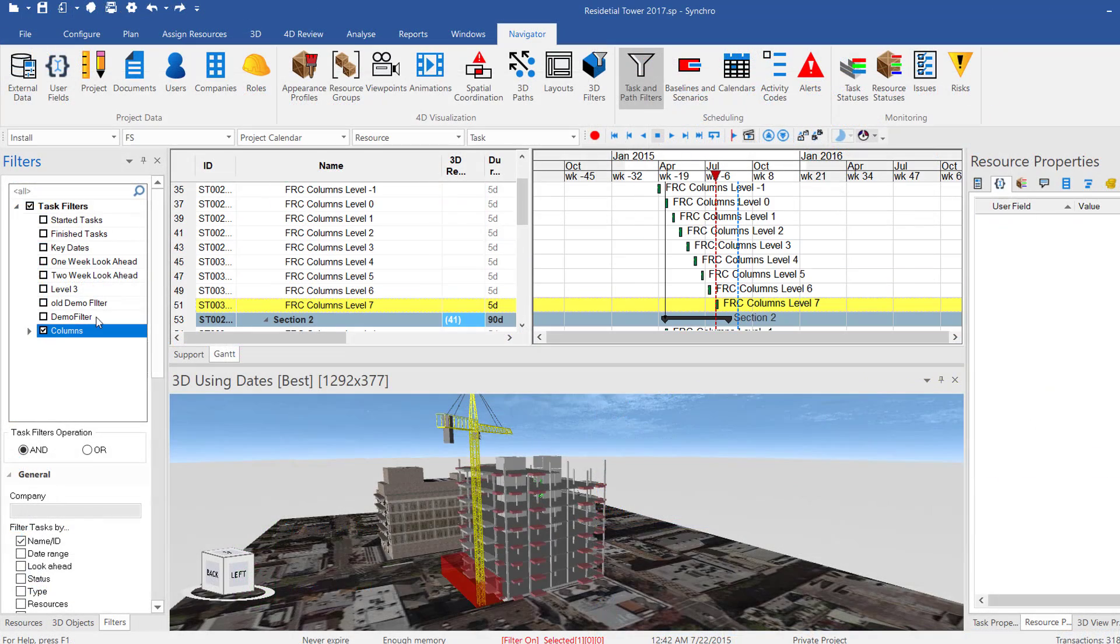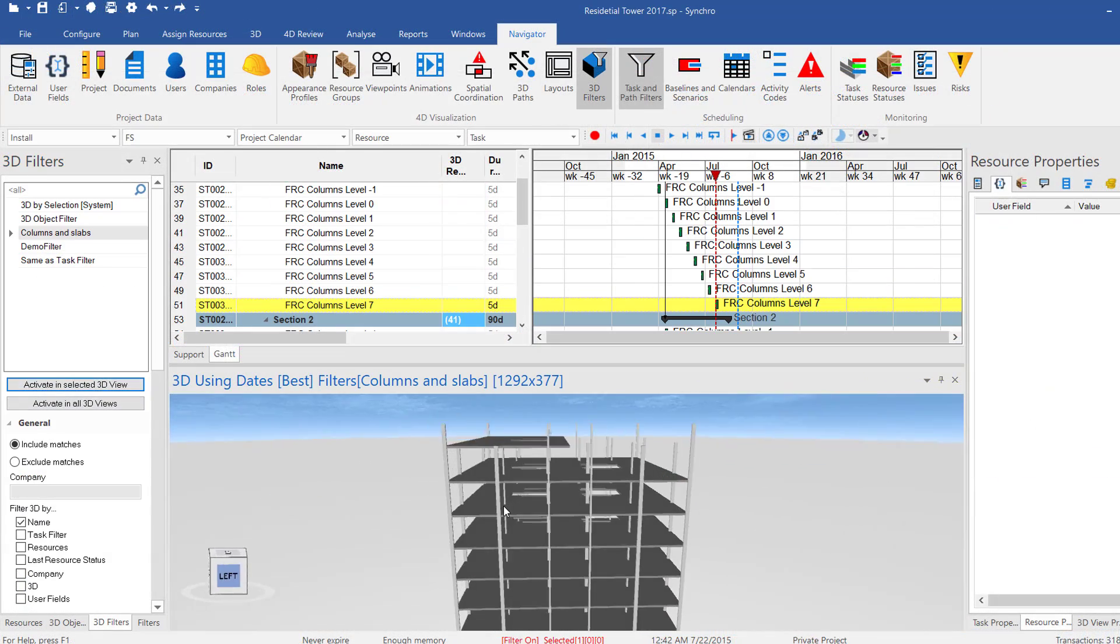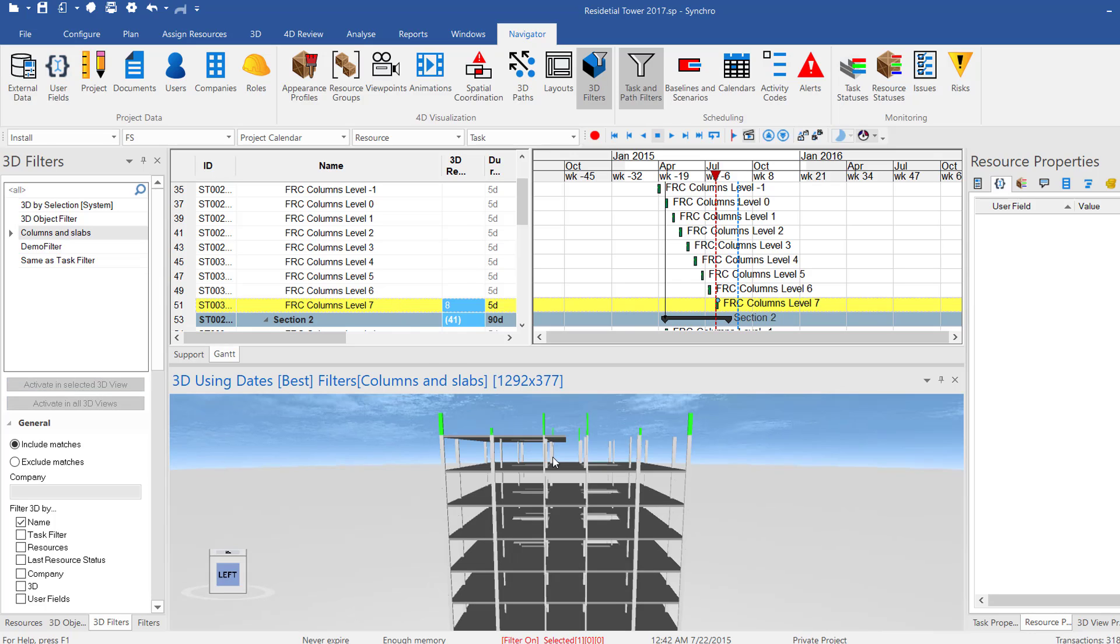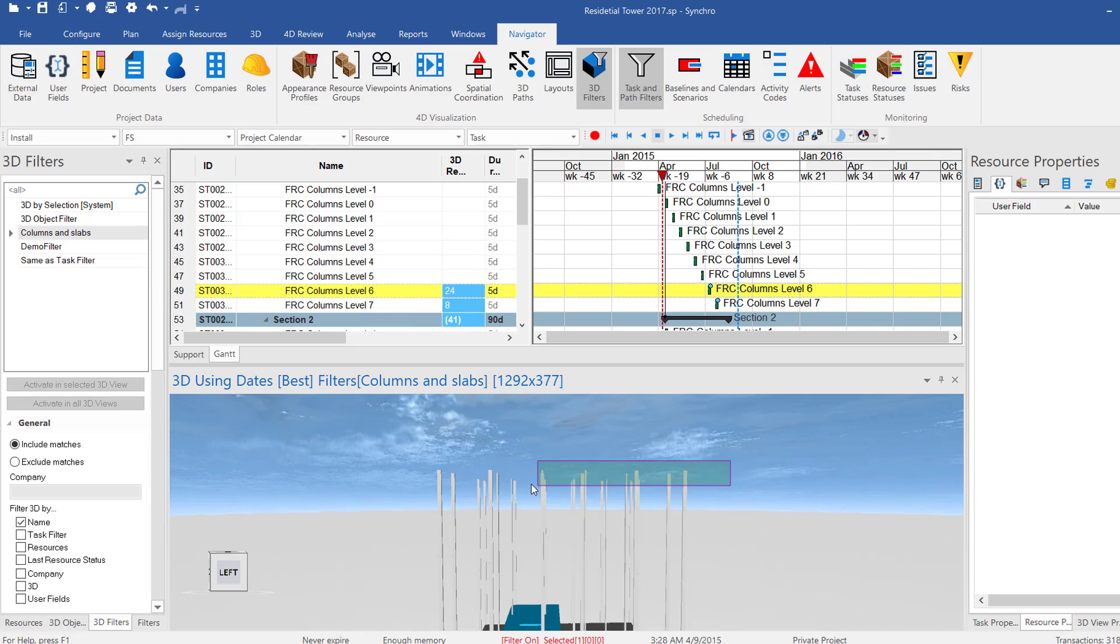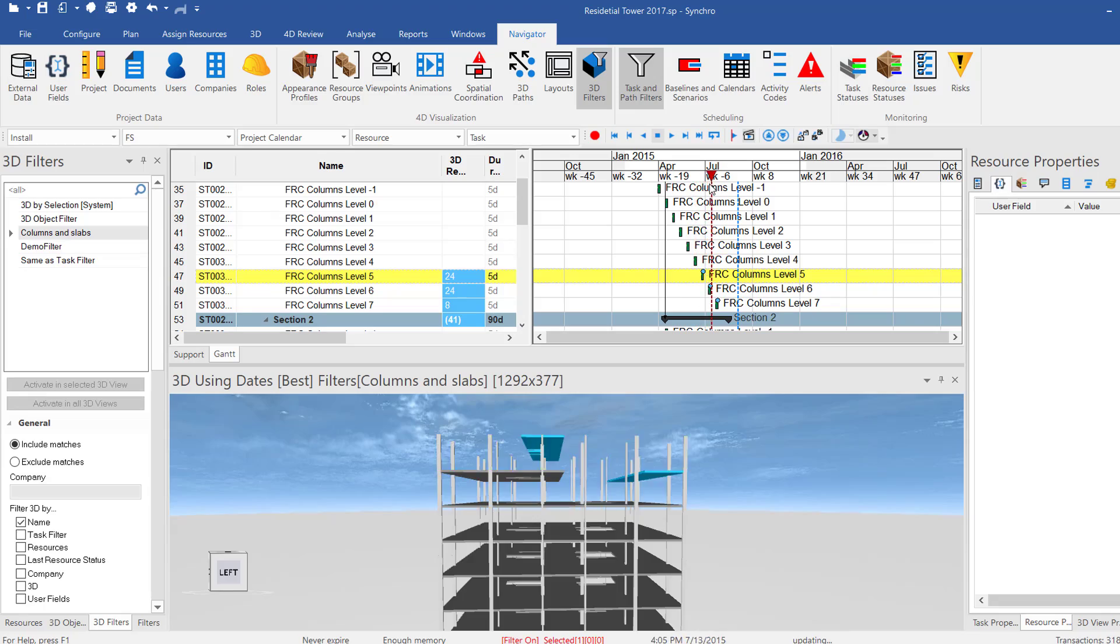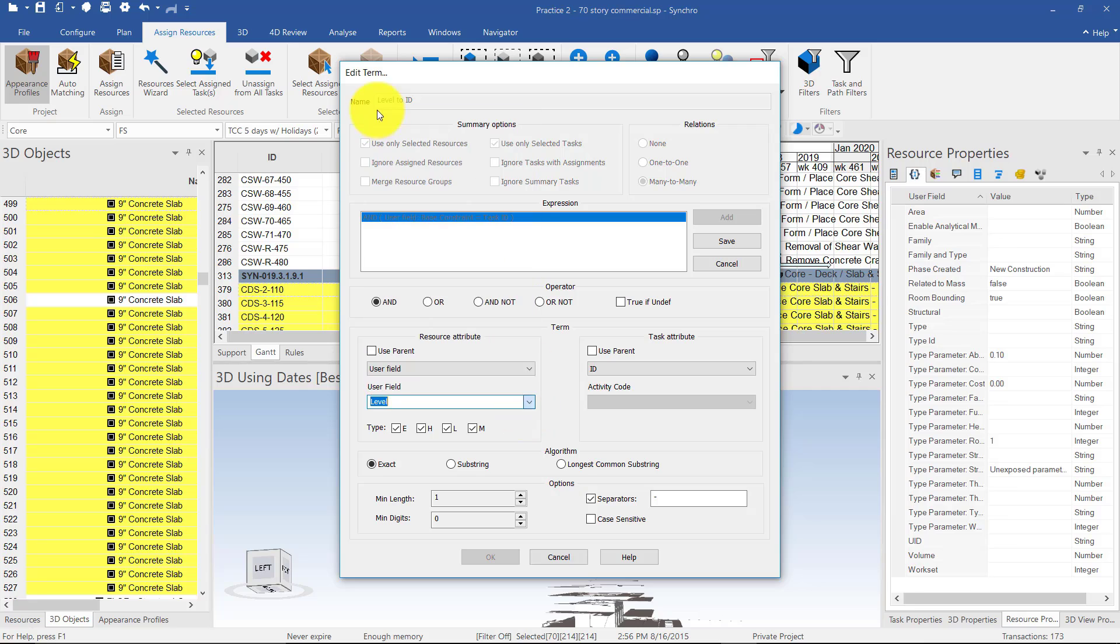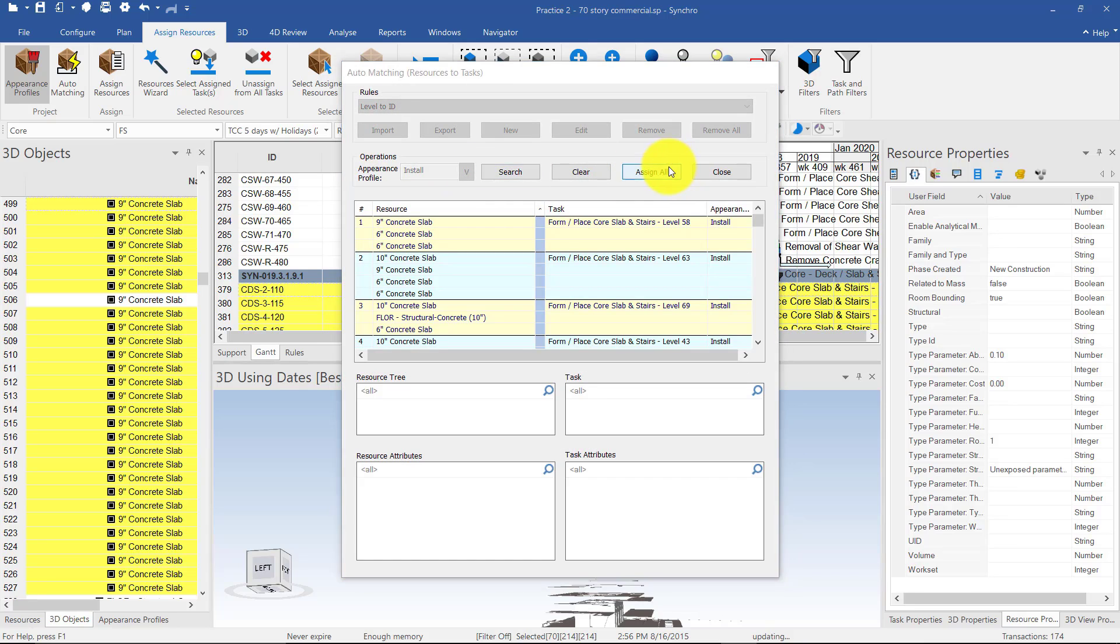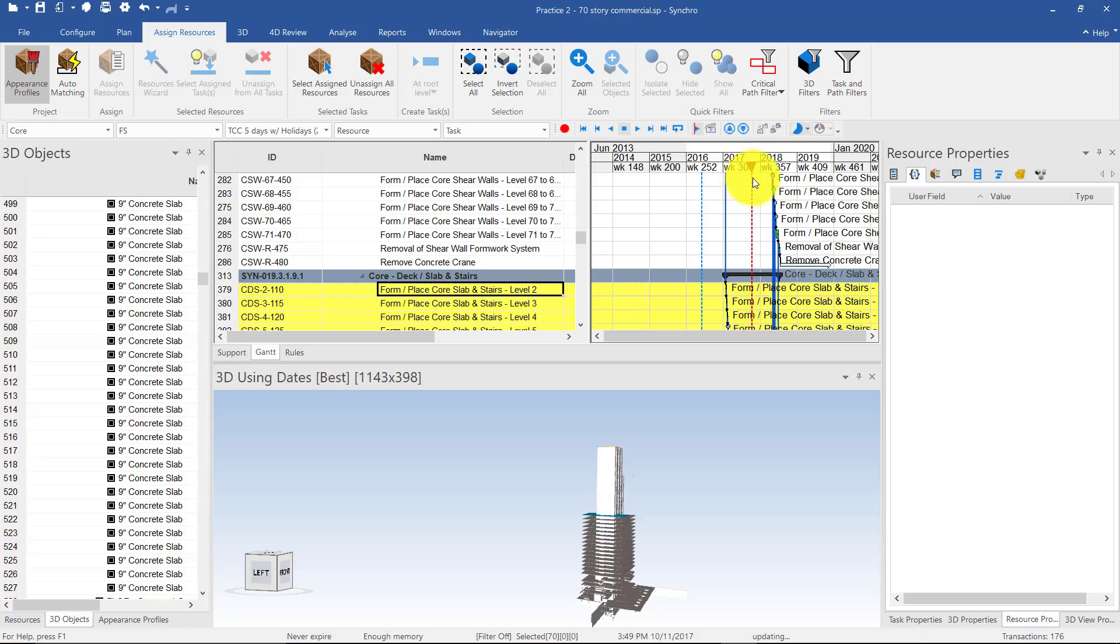If you decided to import an existing schedule, you will have to define how its activities are linked to the relevant model objects. For smaller projects, this can quickly and easily be done using drag-and-drop functionalities in combination with Synchro's advanced schedule and model filtering features. But for larger projects, you will want to take advantage of Synchro Pro's rule-based auto-matching feature which allows you to leverage all of the metadata that comes with your models and schedules to automatically link them together.